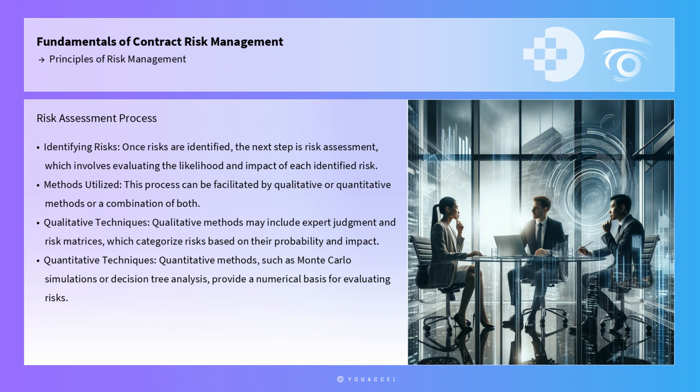Once risks are identified, the next step is risk assessment, which involves evaluating the likelihood and impact of each identified risk. This process can be facilitated by qualitative or quantitative methods, or a combination of both. Qualitative methods may include expert judgment and risk matrices, which categorize risks based on their probability and impact. Quantitative methods, such as Monte Carlo simulations or decision tree analysis, provide a numerical basis for evaluating risks.